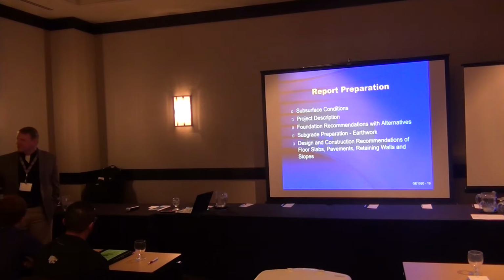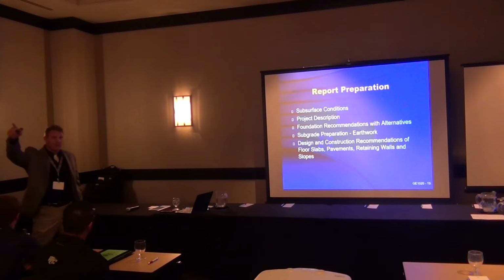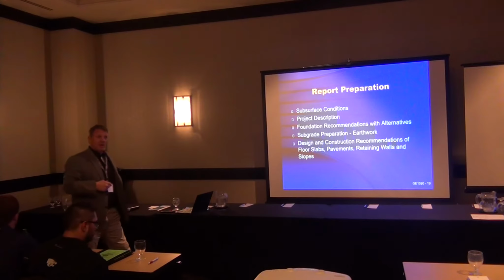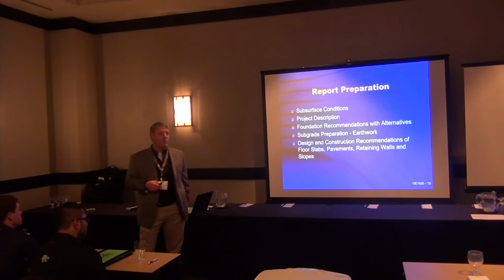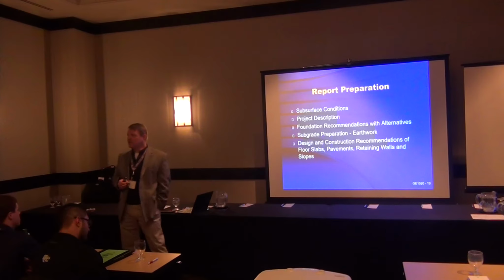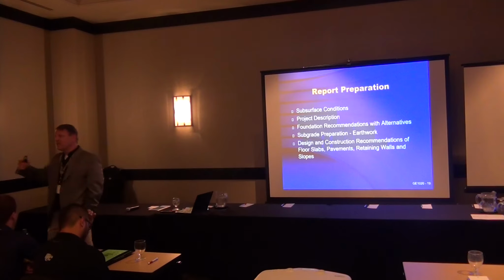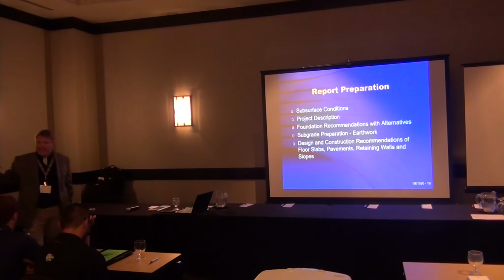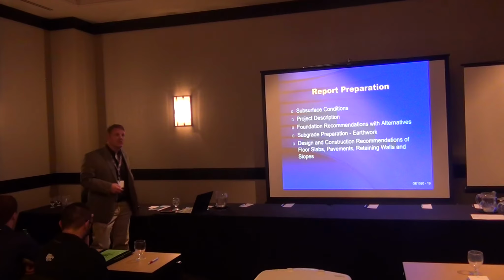A little water, you build a little trench off to the side and funnel it into it and redirect it away from the site. But if you're doing that in sand, and you've got a 70-foot hole in sand, which you certainly can on the west part of Wichita, you're going to have a big water problem. And if you don't deal with that, don't build that cost into your bid, if you're bidding a project, you're going to be in trouble.